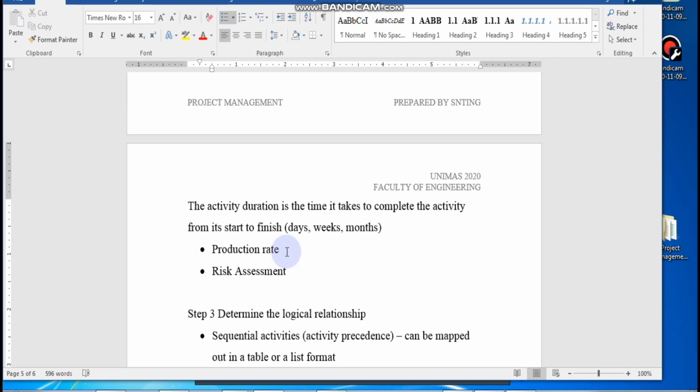So some, yes, it's a very bookish kind of resource, meaning that you get it from catalogs, but you need to factor it up or factor it down. Some is actually by you potentially working with that subcontractor or your team of people, you know how much they can do in a day, you see. So you can always factor it down 30% or up by 10%. You can play around with the production rate. It is not a fixed one. So if the weather is good, maybe they can do more. If the weather is bad, they can do less. Things like that, you can factor in.